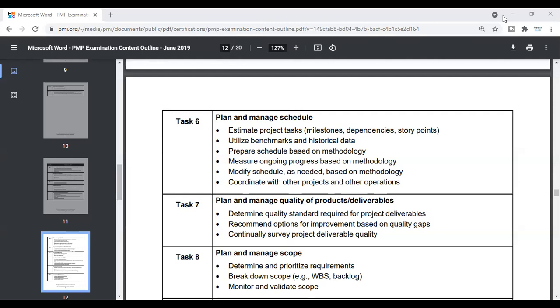And not every team goes down to that level. But in the PMBOK Guide 6th edition, it shows you how the roadmap is broken down. So you think about the higher level release, then you think about the iterations within the release, you think about the features within the iteration, you think about the story. So how all that comes together is very important as well.